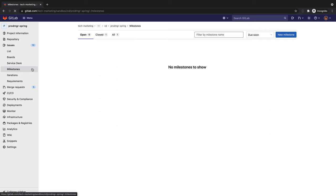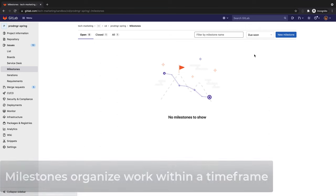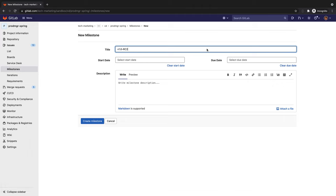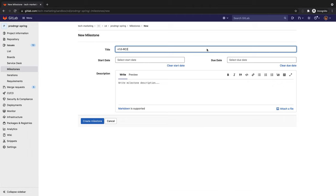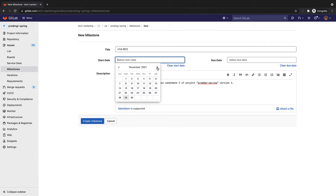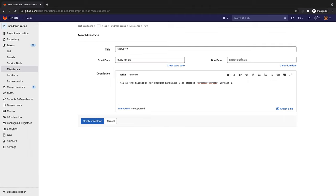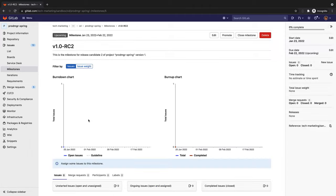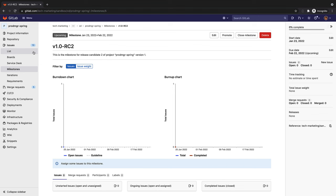Rachel creates a milestone that will be associated with the second candidate release of the first version of their ProdMGR Spring project and associates to it all the issues that the release will comprise.